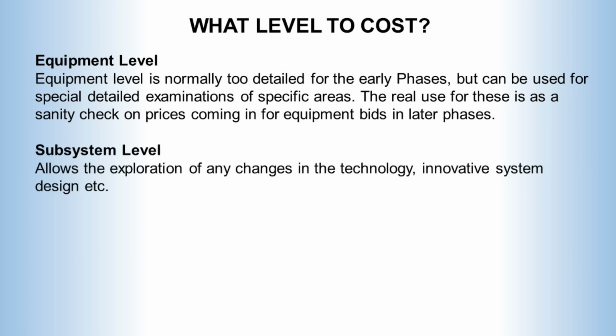The next level is to cost at the subsystem level. This requires less detail in the design, although a good feasibility study should be assembling realistic assessments of the size of the subsystems required. Subsystem estimates should tell you where the expensive bits of the design are, and in cases where novel technology is involved and where the parametrics become simple guesses, it at least brackets the uncertainty to just a part of the total system cost. It is also a level where the system team can do the costing without involving the subsystem departments and potential subcontractors.